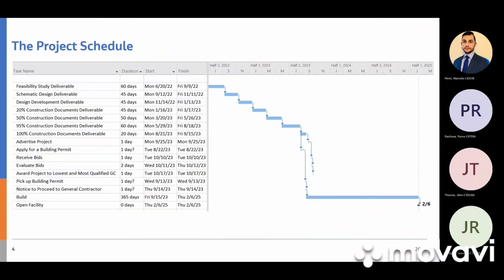it's called a milestone schedule. It reflects the duration of an entire project, the whole project. And this is created by you guys, project managers. When you create this schedule, you take into account all of the project stages that we discussed last time, right? Starts with conception, your feasibility study, and it takes you all the way out to conclusion when you open the facility. And this is what you use to manage yourself and to orchestrate the project team.